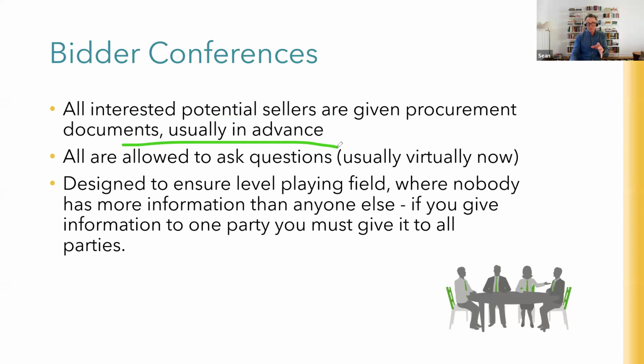They're all allowed to ask questions, and that's why we have things called bidder conferences. Where I live in New Zealand, our bidder conferences have moved away from everybody getting together on a particular day and time, asking questions, and the person issuing the documents answering them. It tends to be virtual now. You upload your questions. General rule of thumb: if you're going to answer a question, everybody gets the same response.